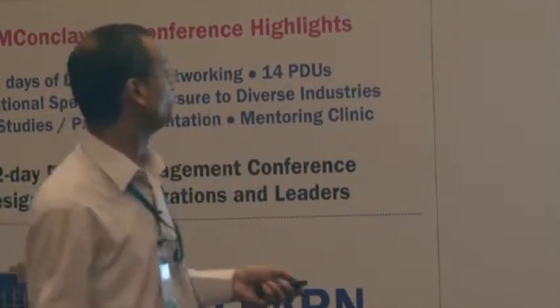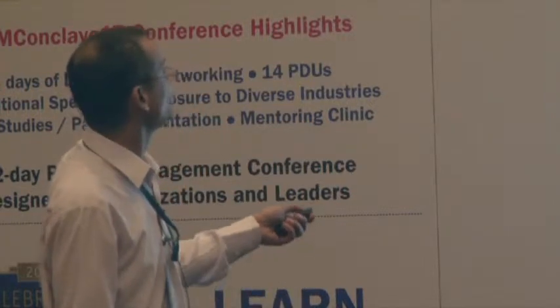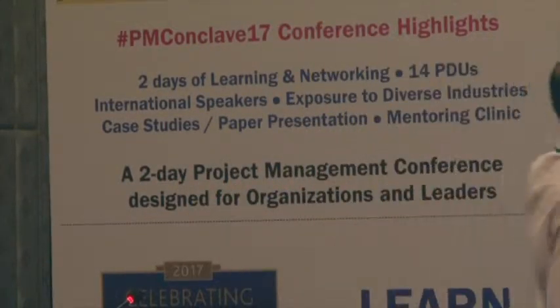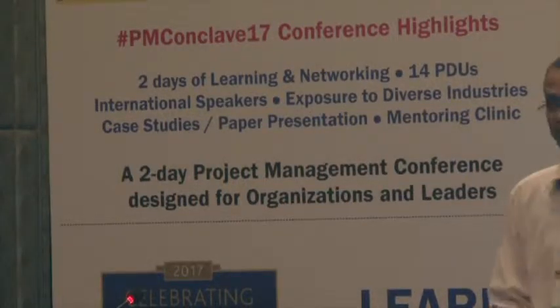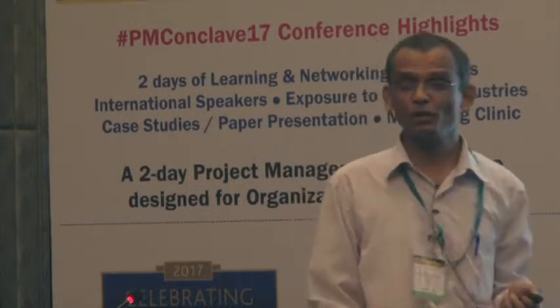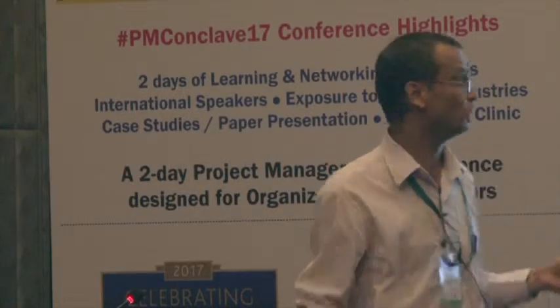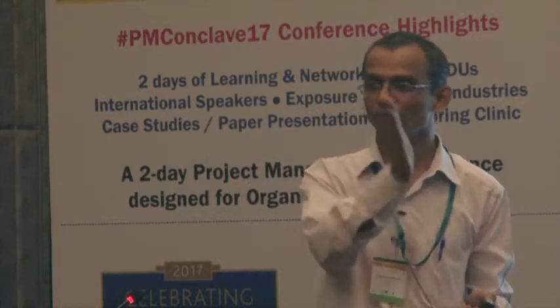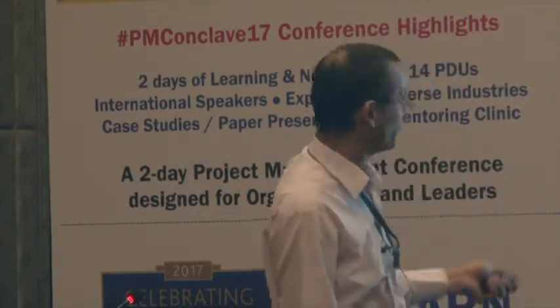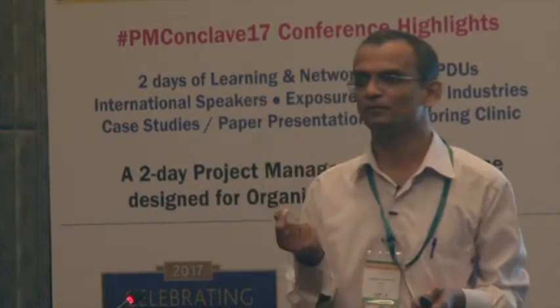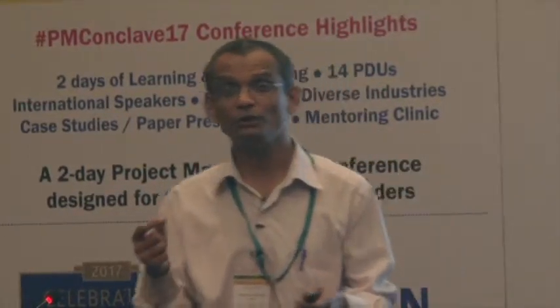Somebody can say, sir, do one thing. Add up all this, consider only the pessimistic scenario. That's the safest approach. But it is something like this. All the tasks happening here, as per this number, will be 17%, that's 0.17. So the probability of the project finishing as per all the pessimistic scenario will be 0.17 into 0.17 into 0.17 into 0.17, into the number of tasks. That's a very, very small probability. So we really do not have to plan for that very, very worst case scenario.